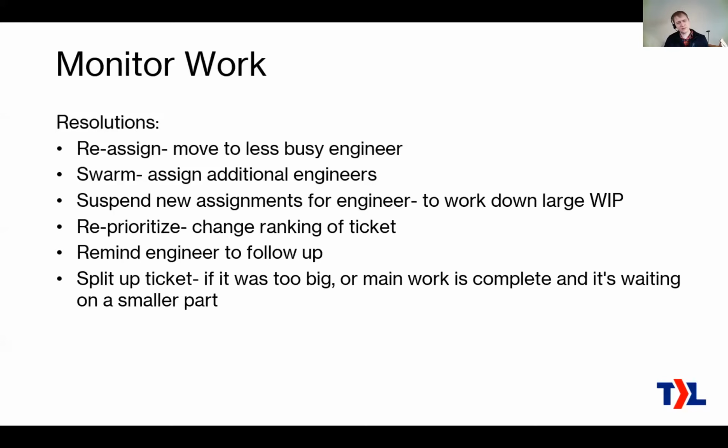Another way is, sometimes you get tickets where it turns out the ticket was just too big. Whether or not you knew that at the beginning, it's like multiple days of work, and it can take a while to get through that sort of thing. So maybe you want to split it up into multiple smaller tickets, or it could be that maybe a technician has finished 80% of the work on that ticket. There's still 20% left, but that 20% is less important, or maybe that 20% can't be done until next week, for example. It's okay to split that up into 2 tickets.